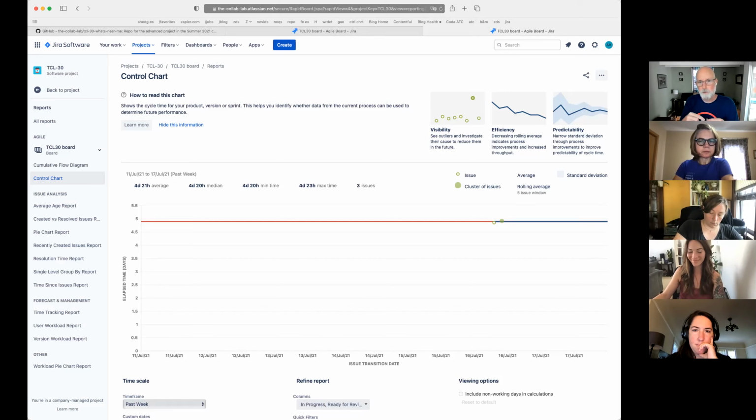But the thing that's important in Kanban is that we try to right size all the issues, like we talked about last week. If the issues are all roughly the same size, we get into a predictable cadence. We can say, if we're supposed to ship this thing 10 days from now, that means we can finish 8 issues. But there are 10 issues on the board, so which 2 can we cut? You can have those kinds of productive conversations about scope or timing.